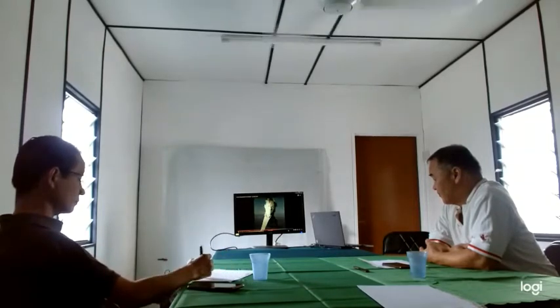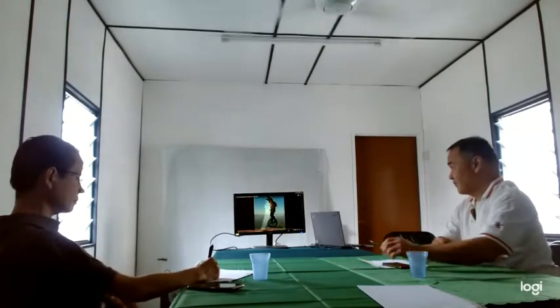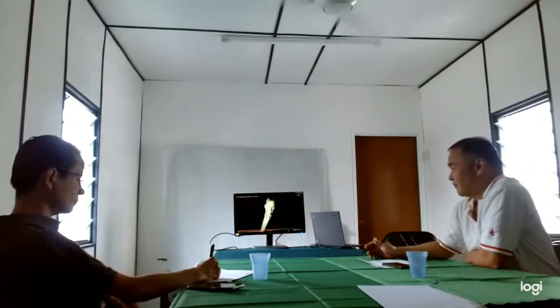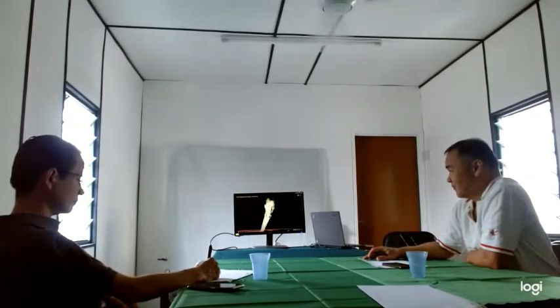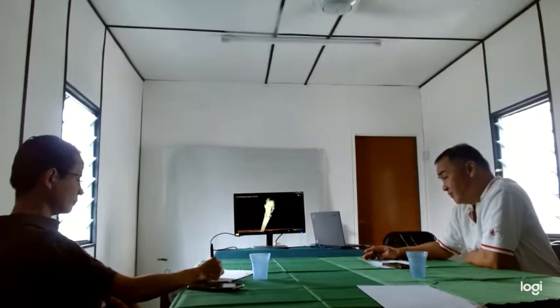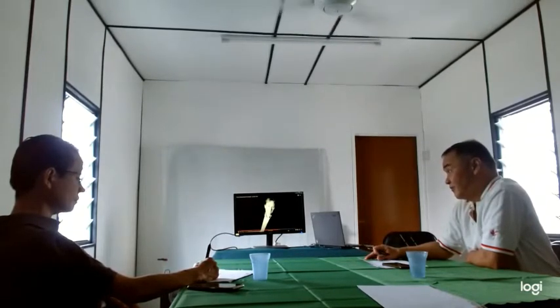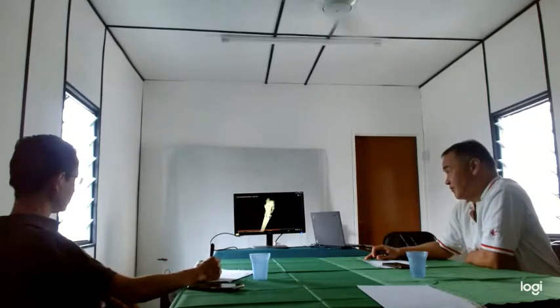The final bit of planning after you've done your Gantt chart is just to look at it and think, what might go wrong? This is risk. So as a project manager, your skill is also to identify risk. What might go wrong, even if it doesn't go wrong. If they're quite likely and serious, then you really do need to have some sort of plan. If they're not likely or serious, then you don't need to worry.